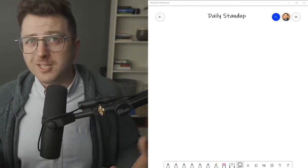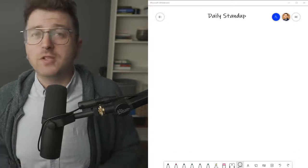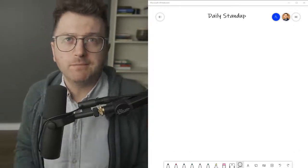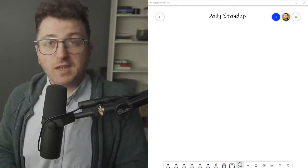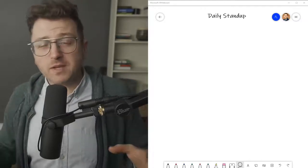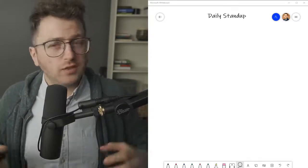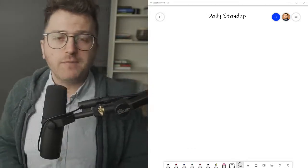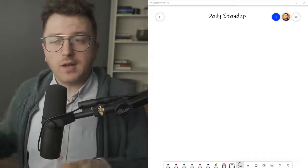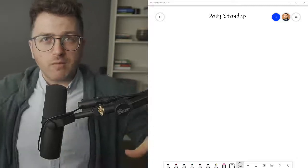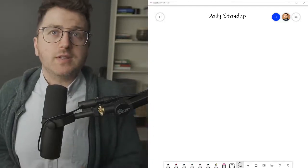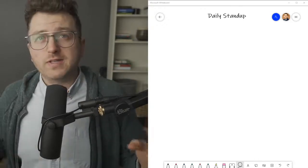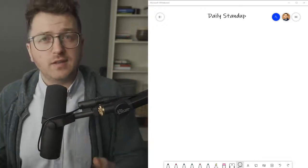Usually the norm is a maximum of seven people in a stand-up team. If the development team is bigger than that, you can definitely just break it into two separate teams. Even if they work on the same project, they should have two separate scrum masters.